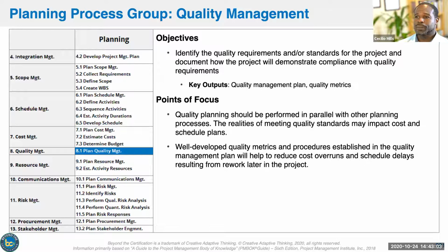And the Department of Transportation can say the standard needs to be that if something hits freezing, this thing should not contract more than 5/100ths of a millimeter. And if it gets to over 100 degrees, it should not expand more than 5/100ths of a millimeter. Now I can produce 5 types of bolts. I can produce one that expands 1 each way, 2 each way, 3 each way, 4 each way, 5 each way. All 5 of those will meet the requirements with consistency. Therefore, they are high quality.